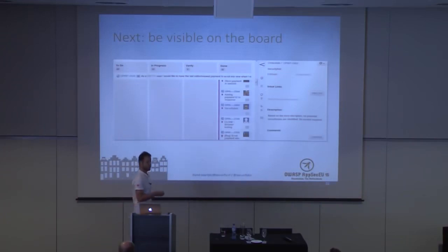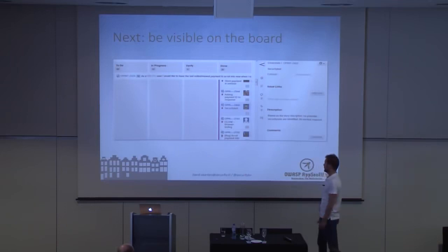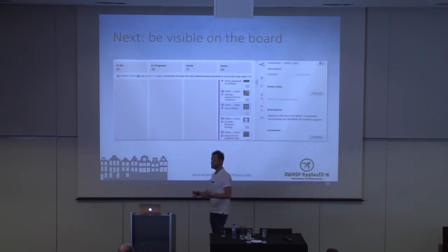In these stories, if during a grooming you see that a story doesn't need security testing, which is quite a decision, right, so we just skip security testing for this user story because from a story perspective, I think it's not needed. So we had to get our assurance, and if we decided this, we put into the comments why we did it or why we did not.